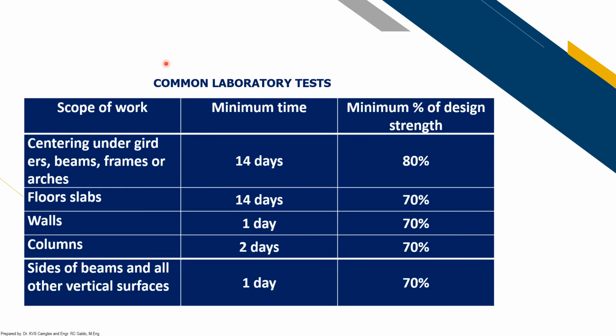Okay, so aside from the test duration, the minimum number of days for those specific tests, DPWH also provides in its standard specification the minimum time for removal of formwork. The removal of your formworks depends on your scope of work, and each has a different minimum time.